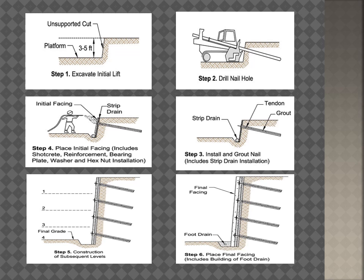This figure shows the six-step procedure for the construction sequence of soil nailing: step one — excavate initial lift; step two — drill nail hole; step three — install nail and grout; step four — place initial facing (shotcrete); step five — construction of subsequent levels; and step six — final facing is placed, with foot drains, weep holes, or drainage ditches provided for dewatering.